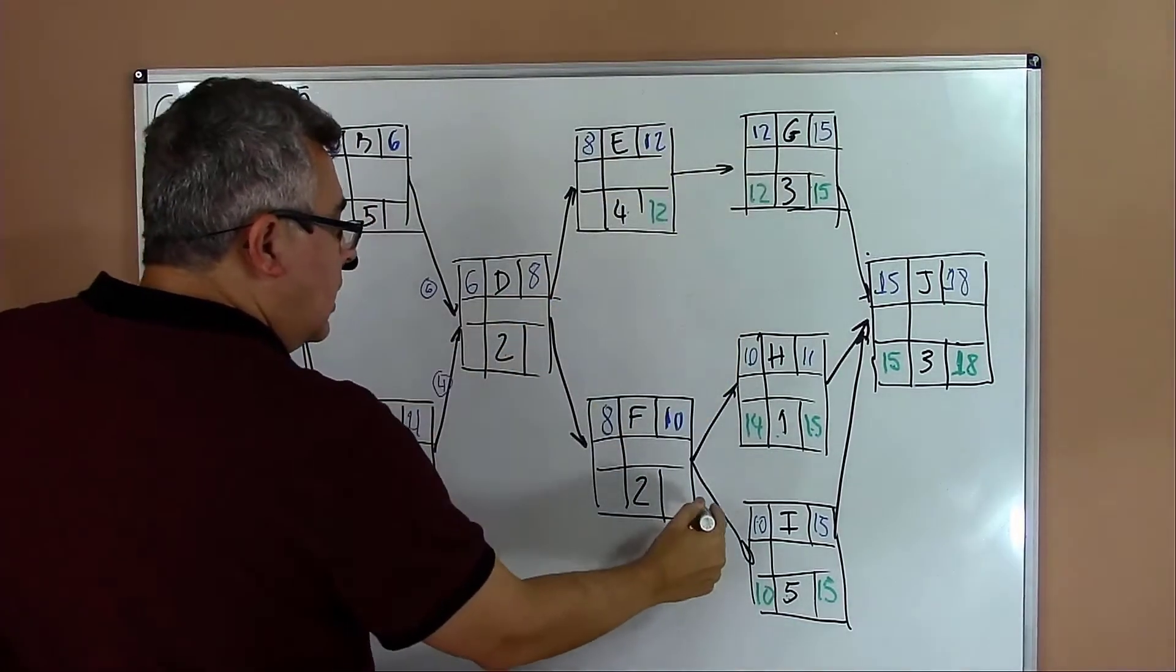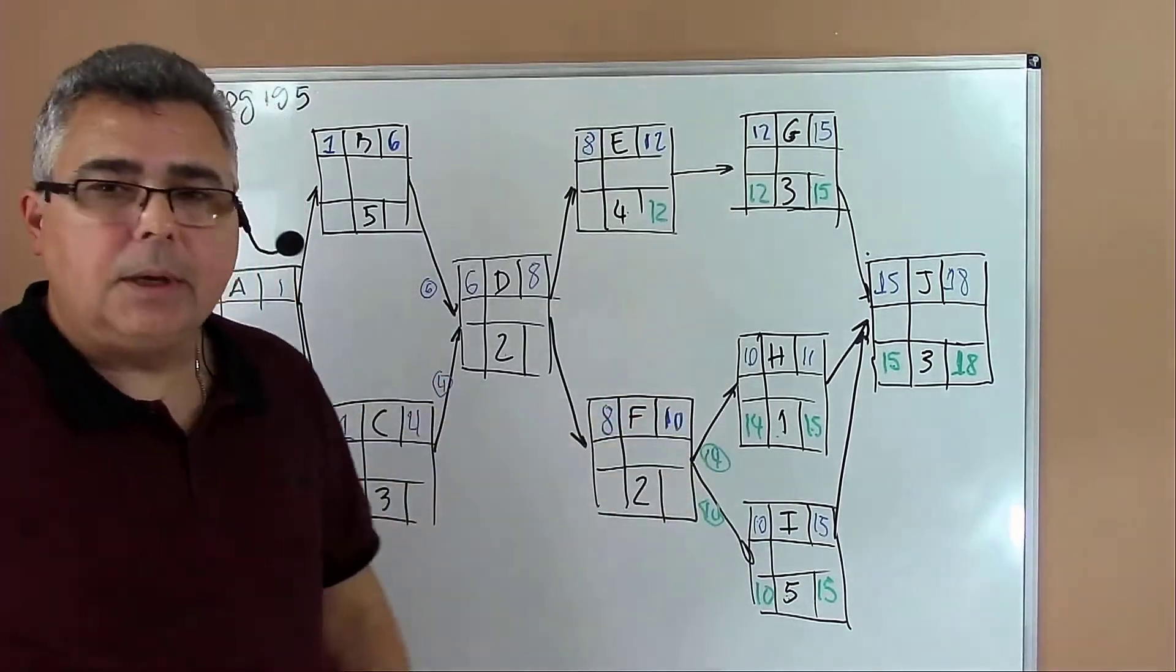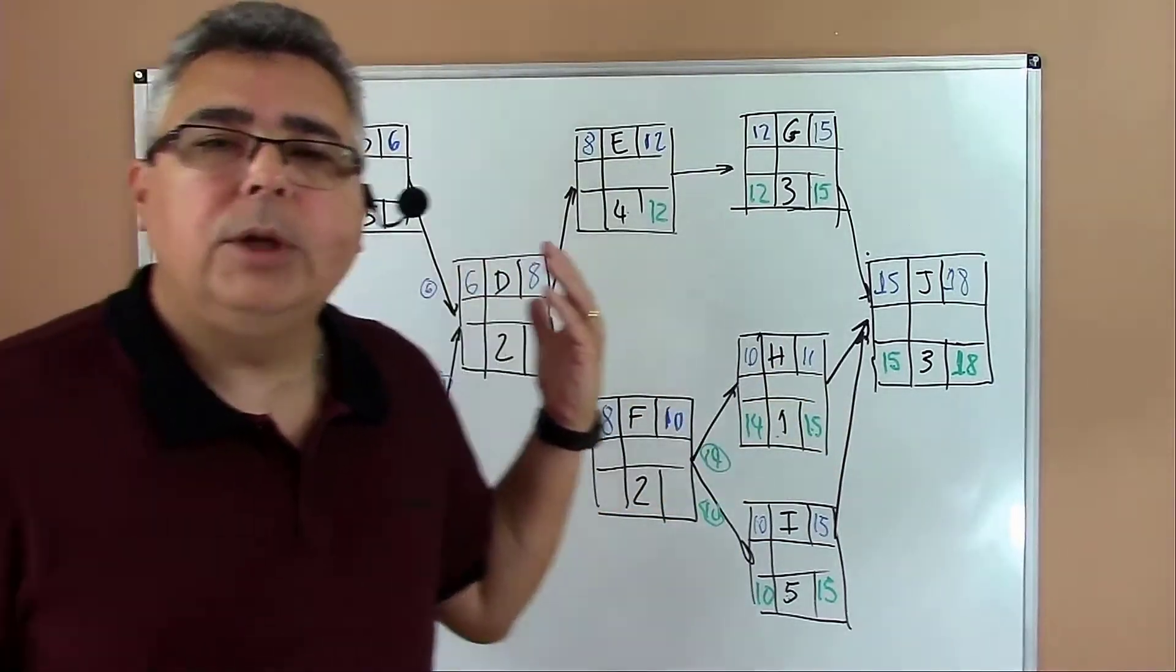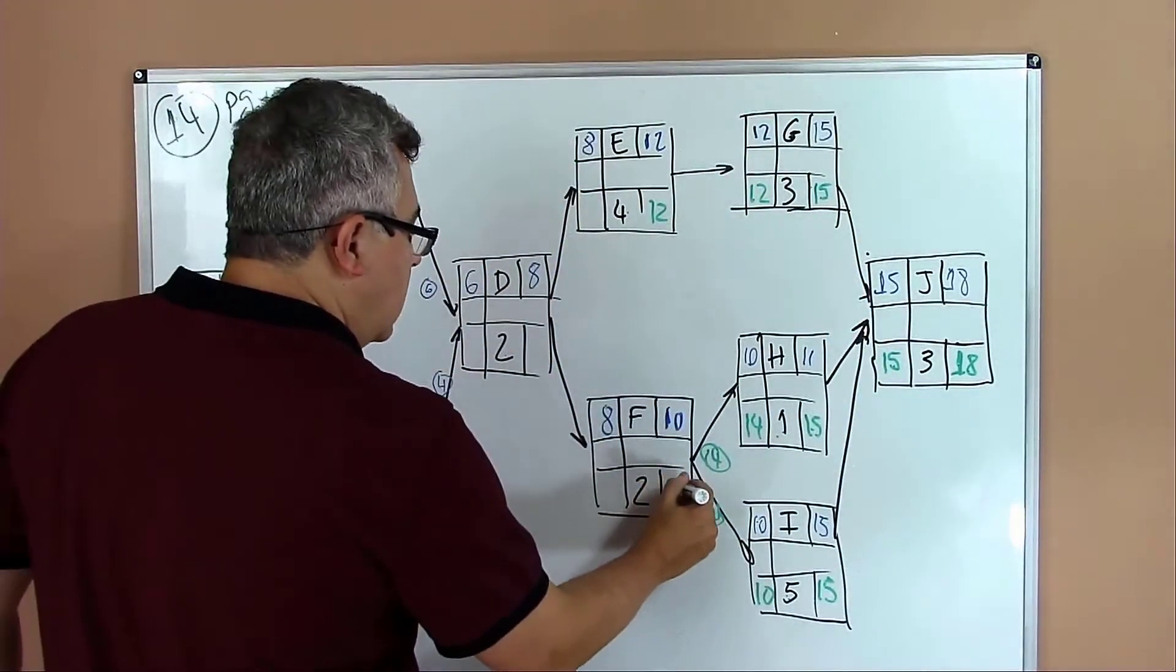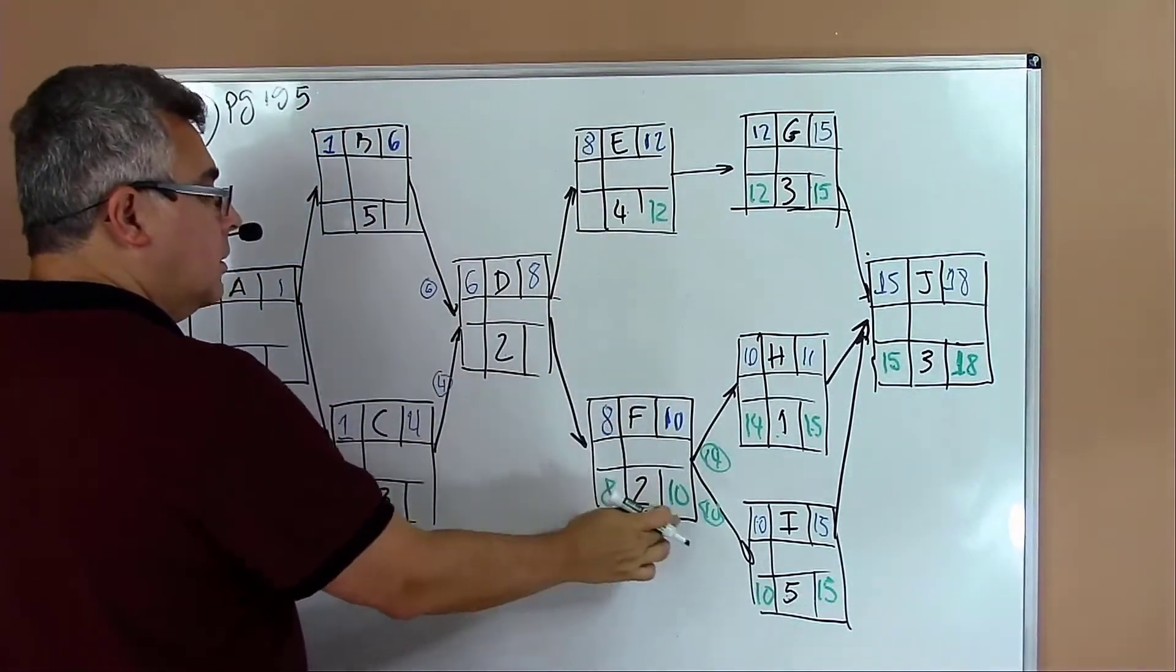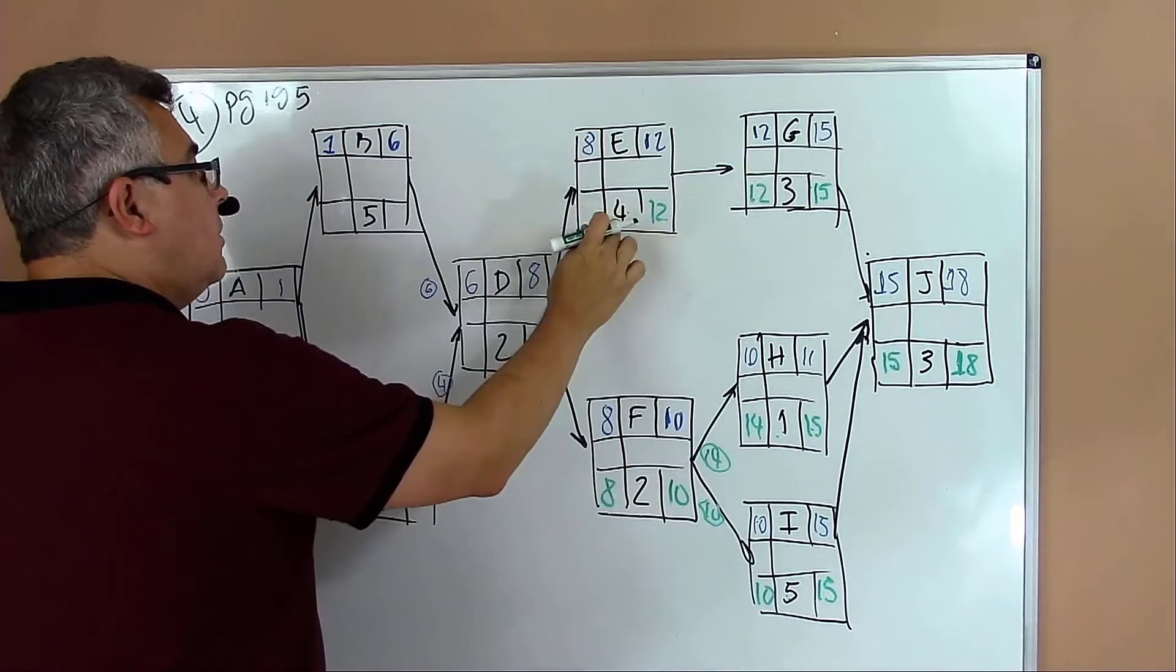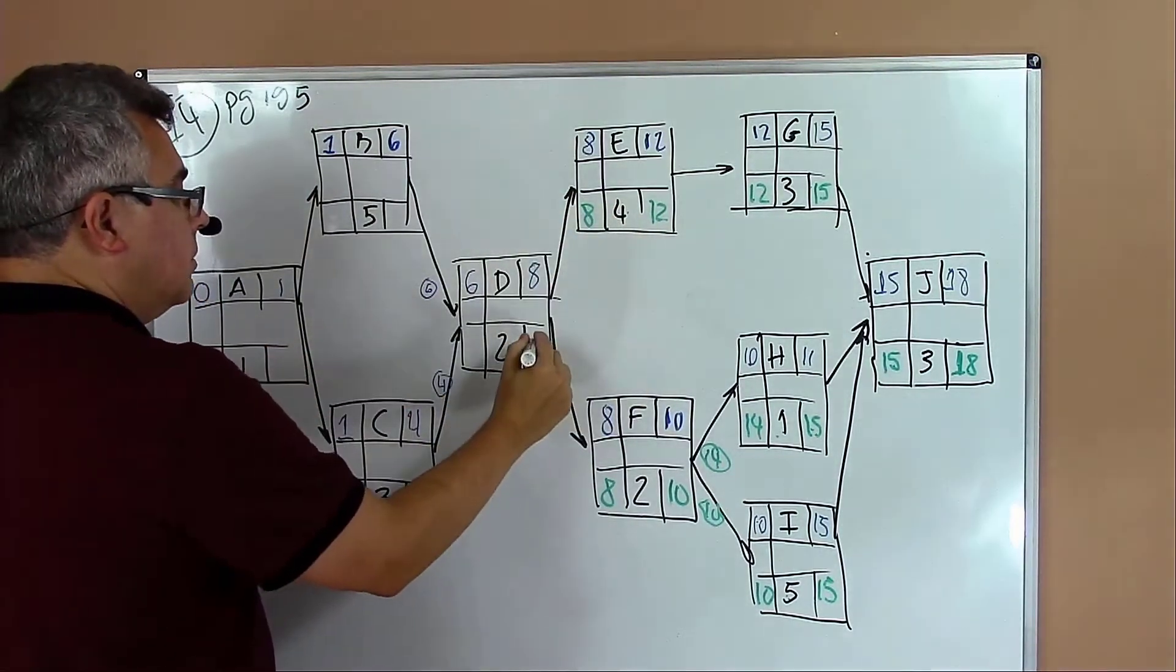Then I move backward. Fifteen minus three equals twelve. I move twelve to activity E from activity G. Here I have two numbers, fourteen and ten. Which one should I pick? In the backward path we should pick the lower number. Pick the lower number and start computing. Ten minus two equals eight. Fourteen minus four equals eight.